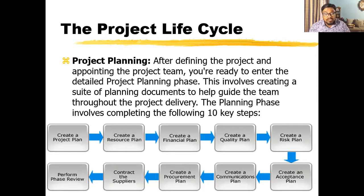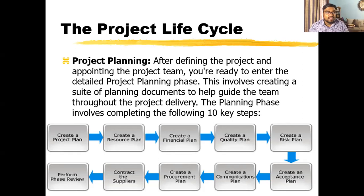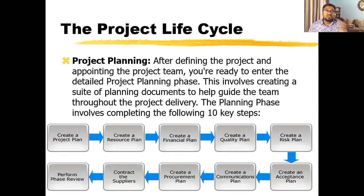Create an acceptance plan — the terms and conditions that need to be satisfied to accept the project. Then create a communications plan; nowadays we use a multi-channel communication plan. Create a procurement plan — how you will procure machinery, materials, and technology. Contract the suppliers and finally perform a phase review, because a good plan means 50% of the project is done. Review whether you are on the right track.